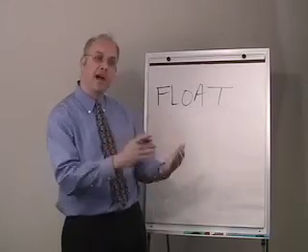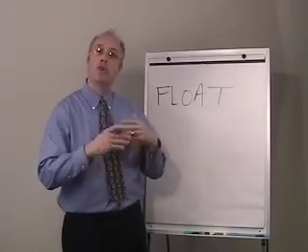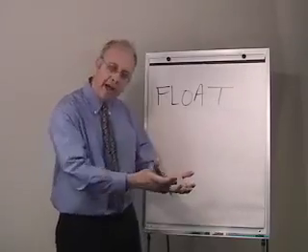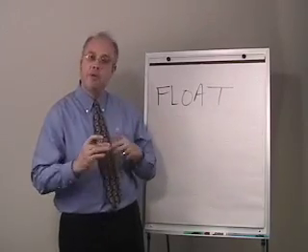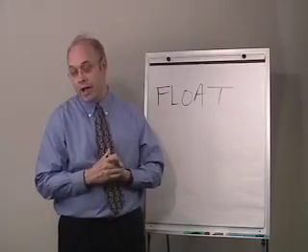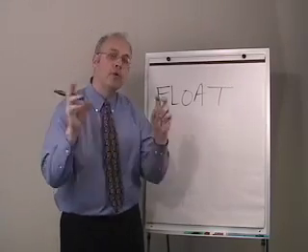In other words, if I was a contractor and my pile driving work had float, then I could use that float to mobilize fewer pile driving rigs so that I could level my equipment requirements and perhaps have lower equipment costs for pile driving. Now, what happens when the float runs out?